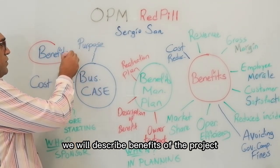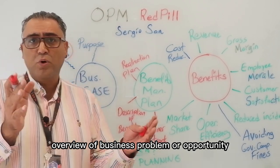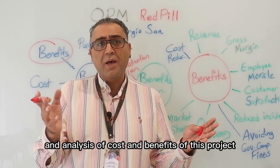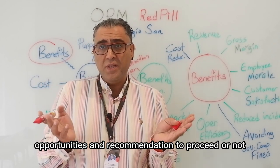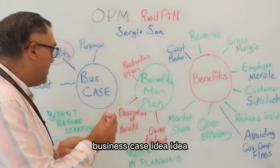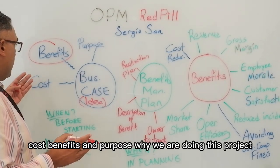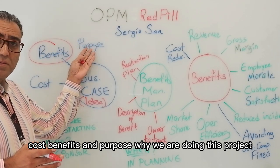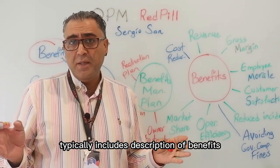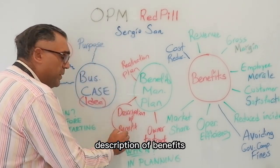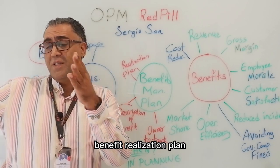The business case typically includes an executive summary, an overview of the business problem or opportunity, analysis of cost and benefits of the project, an assessment of risk and opportunities, and a recommendation to proceed or not. It answers: what is the idea, what are the costs, benefits, and purpose — why are we doing this project and why do we need to invest in it? The benefit management plan typically includes a description of benefits and details to be realized.